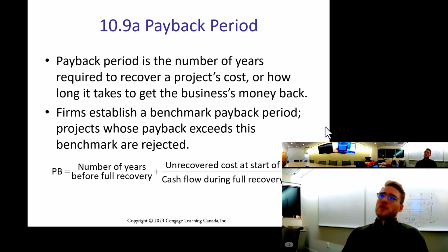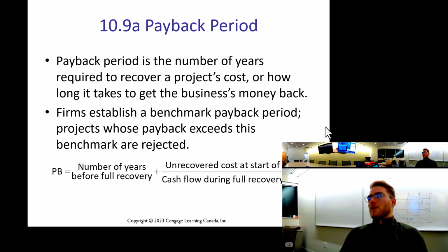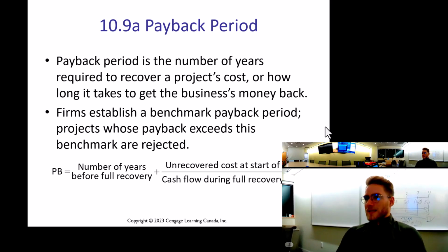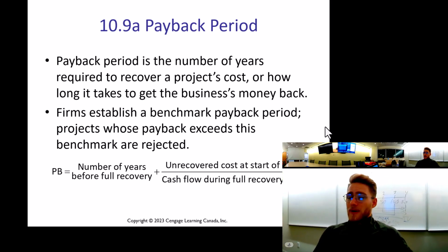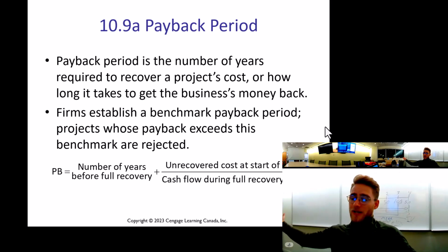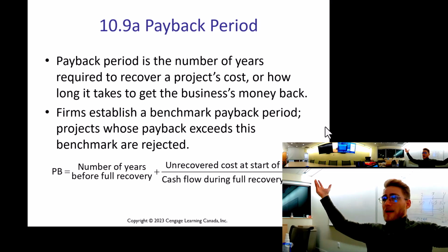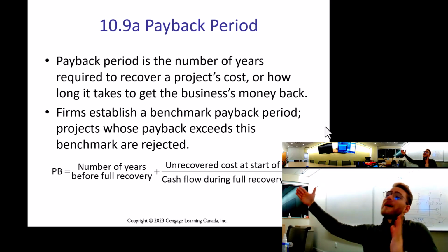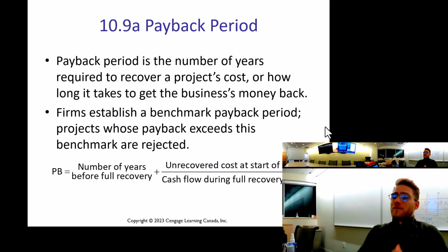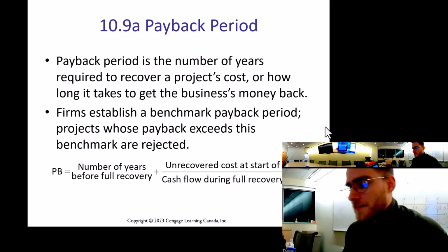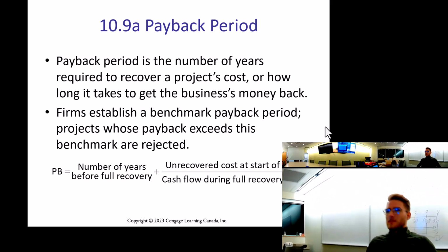As compared to internal rate of return, where it's like, oh, your compound annual return on this project is 16% and your cost is 13%, right? Is this a good project? Who knows? But if I tell you, hey, this project, you get your money back in 2 years. This project, you get your money back in 4 years. You're picking the project with 2 years, right? Because, hey, I get my money back really fast. It doesn't tell you anything after you get your money back, but it tells you how fast you get your money back, right? And that's why this one's good, and it used to be extremely popular.